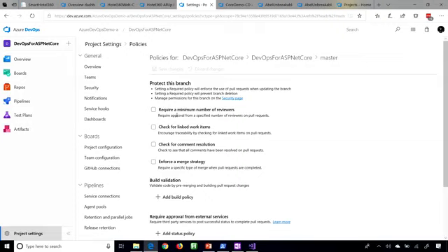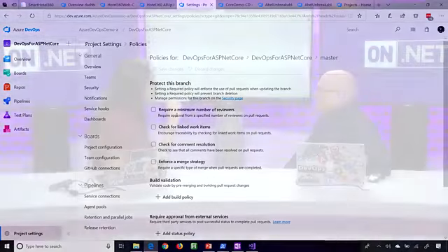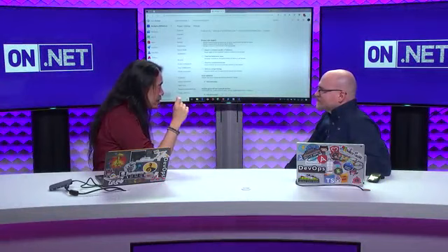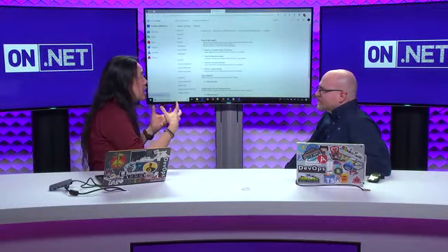So you can even block a pull request if it's not linked to a work item. So we can tie it to why the change is taking place. Is this a story? Is this a defect? Something else? By forcing your devs to do this, and I know devs cringe because none of us like to do that stuff, but like I said earlier, you get an unprecedented view into the health. You'll be able to track everything.